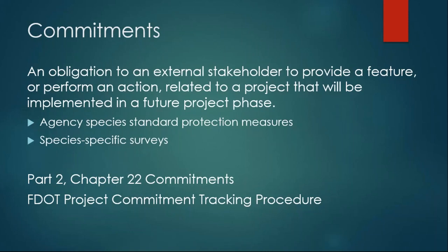Species specific surveys could also be identified as commitments. There is a specific chapter that talks about PD&E commitments, Part 2, Chapter 22. And then there's also the FDOT project commitment tracking procedure that I'm going to refer you to. It describes how the department tracks commitments from PD&E all the way through construction.